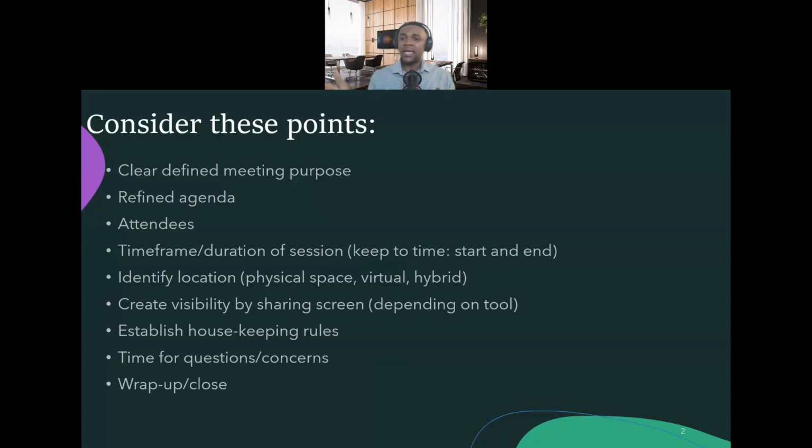Theoretically, the Scrum Guide might say sprint planning should take nothing less than 8 hours if you are doing 4-week sprints. But realistically, we know that might not be possible. What I used to do in my organization, previous and even current, is tell my attendees what they should expect in terms of how much time they should allocate for any of the ceremonies.